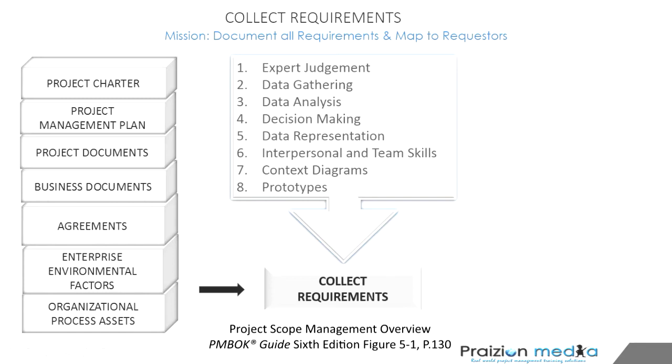And the last tool and technique is called prototypes. Prototypes are very helpful in gathering early feedback about a widget, a design, maybe a deliverable. If you do a mock-up prototype, as it were, you can get feedback really quick as to whether that is what the customer had in mind, whether that's what the sponsor is thinking about or not.